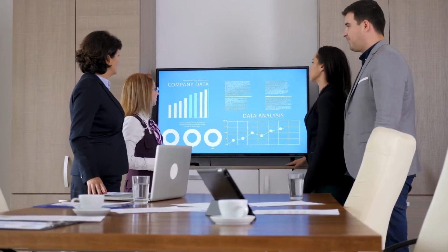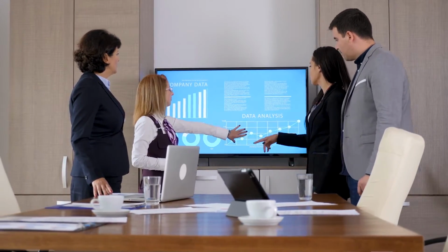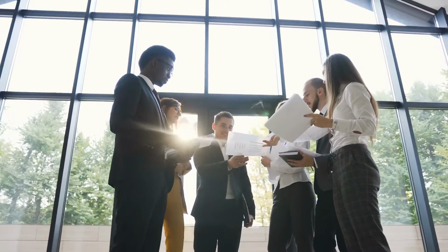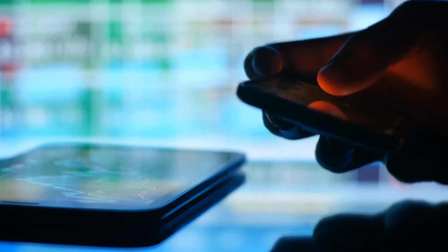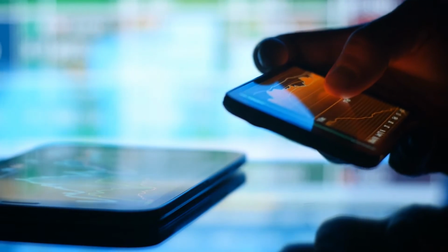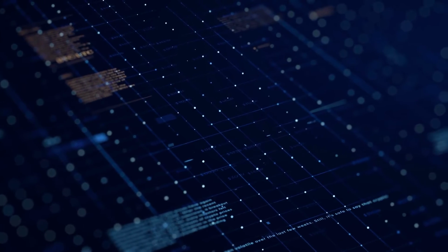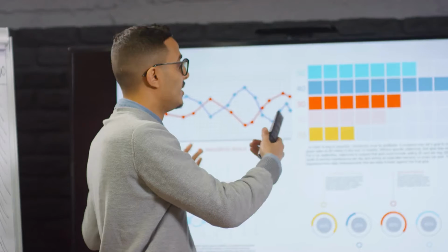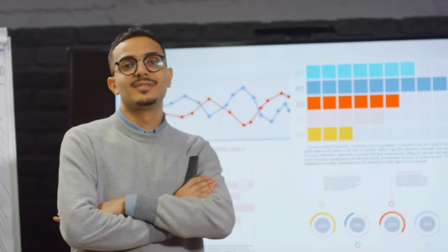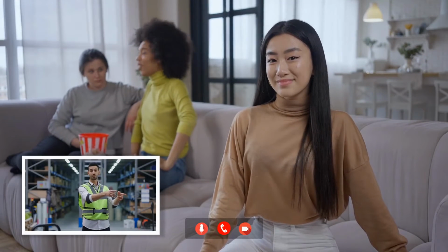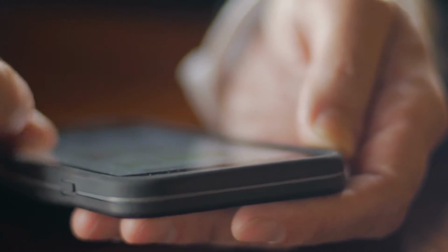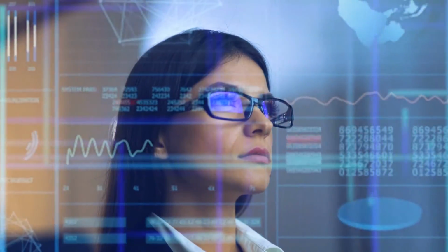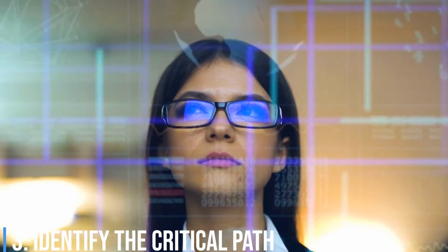Example: Task ID, description, predecessors, duration. A. Market research, 2 months. B. Product design. A. 4 months. C. Development of prototype. B. 2 months. D. Contract suppliers for materials. C. 2 months. E. Manufacture product. D. 3 months. F. Design marketing strategy. C. 1 month. G. Launch promotion. F. 1 month. H. Launch product. E. 1 month.